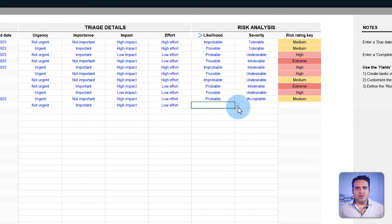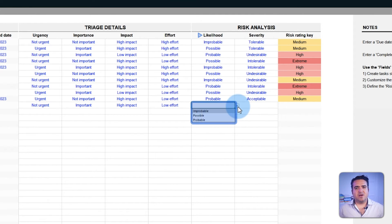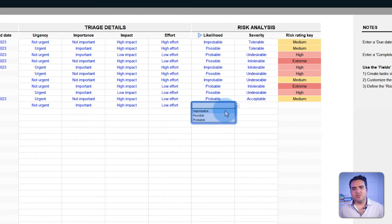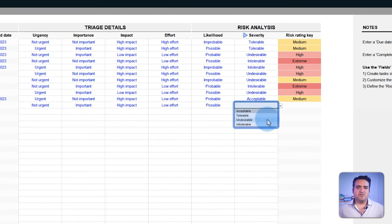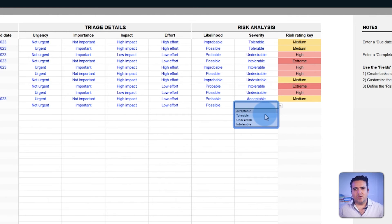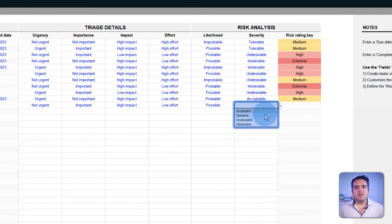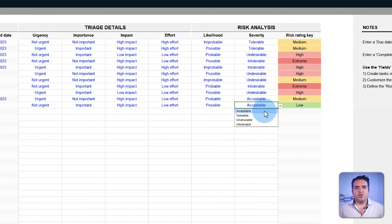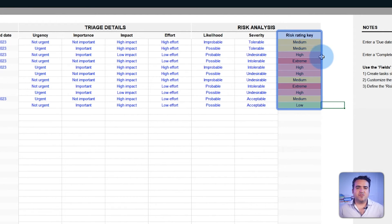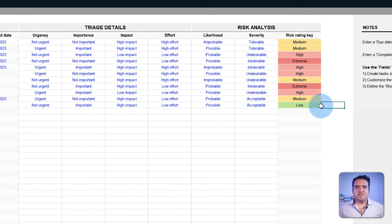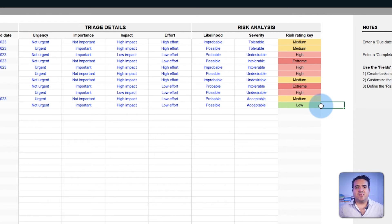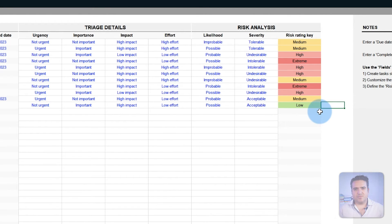The likelihood field can be categorized by improbable, possible, and probable, while the severity field holds values like acceptable, tolerable, undesirable, and intolerable. The combination of both fields results in the risk rating key field. This metric comprehensively assesses the potential risk associated with each task or decision.